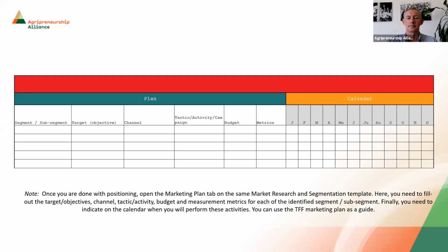Okay, well, while you're thinking about a few more questions, we did have a couple of questions last week that maybe we didn't have time to answer completely. And one was related to the activity chart, the Gantt chart that we've been discussing today. And the question was, how can we register the activities week by week? So this is very simple. If your plan needs to be that detailed, you can just easily modify the Excel sheet to have a much more detailed week by week activity plan. So in that case, you would basically have two: one very detailed week by week activities, and then one more month by month, where you see an overview of the different activities you need to do.